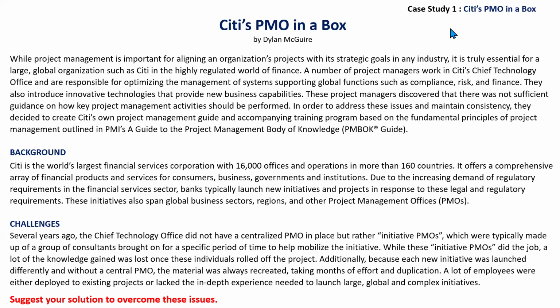So therefore, maximum use of the same employees for similar projects, then further train them, and maintain a database of the history of the project: what kind of period and time consumption the previous projects had, the utilization of material, and how many consultants and what kind of consultants were used for the project, etc. So a lot of information can be gathered by maintaining a database for the project. So these are our solutions, ma'am.